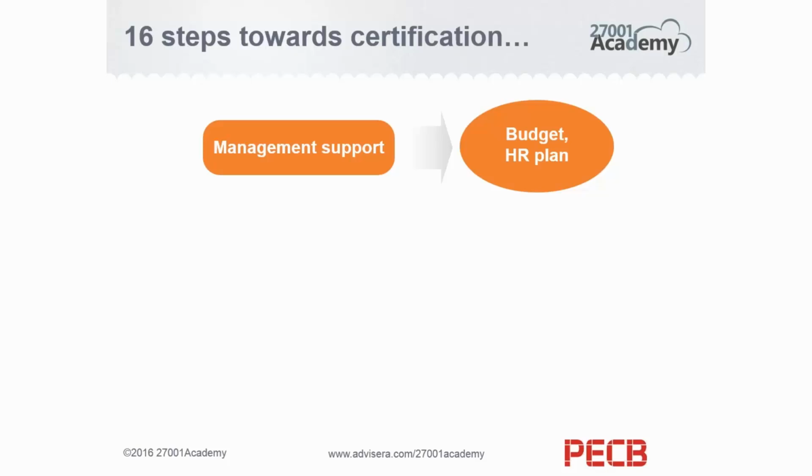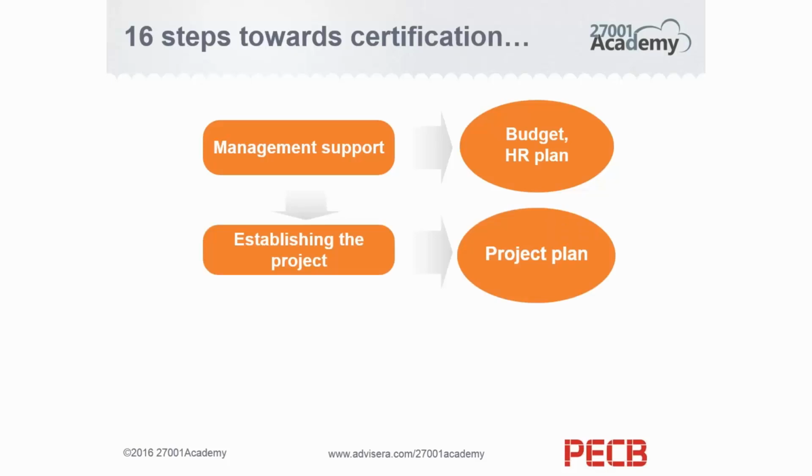This is something that should normally be reflected in your budget, in your human resource plan, and these kinds of things. The next step is to establish project management, because you cannot expect this standard to be implemented just along the way of some other things. So you can't give the task of ISO 27001 implementation to your system administrator and tell him, look, take some time to do this alongside your regular job. It's not going to work.